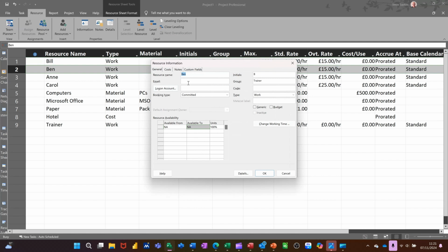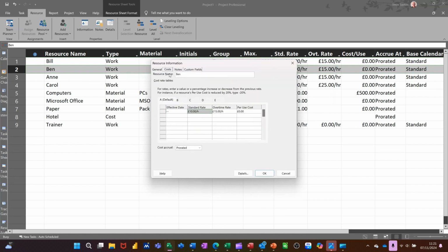Now at the top, you've got a cost field where you can, for example, if you've got, this is his default rate. If you've got him working somewhere where you get danger money, so if I say from the 18th, he's going to be on £15. I won't bother with overtime. His rate is going to be £15. And then a week after, say he's going to some hostile place, it comes back down to his default rate, 10. For that week, you'll be paid at £15 an hour.